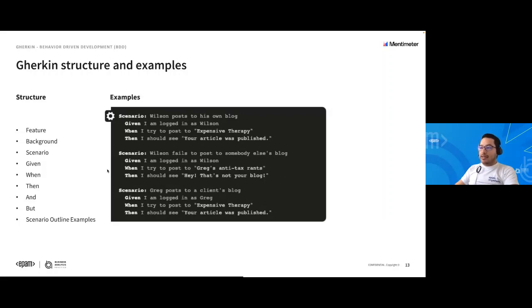Moving on, this is an example of different scenarios that you can have in a user story. I want to highlight three keywords: given, when, and then. The use of the given keyword is to put the system in a familiar state before the user starts interacting with the system. However, you can omit writing user interactions in given steps if given is the precondition that you are handling. The when sentence is the step to define the action performed by the user, and the then keyword is to see the outcome after the action in one step.